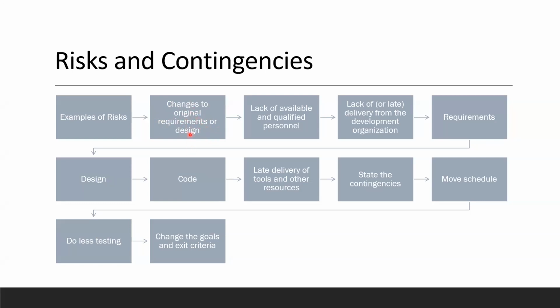So as a tester, you should always be able to say, hey, this is too late in the game, I don't think we can do it, this is going to be a big risk if we try to introduce it. At the same time, if it's not too late, still you want to make sure, hey, this is a big change, it's probably going to deteriorate our velocity based on the capacity overload. So we might need to move some stuff out.